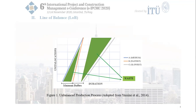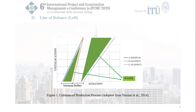Stage buffers between major phases introduce additional safety contingencies for the duration of each activity in a network. The optimum rates for production can be defined by the functions of natural rhythm. RDT in 1988 defined natural rhythm as the optimum rate of production that a crew of optimum size will be able to achieve, and Biotta in 2017 used it as a delivery rate. Any rate of output difference inevitably yields idle time for labor and equipment. In LOB, to shift the start time of an activity, the activity must be assigned a finish-to-start relationship with its preceding and succeeding activities. The slope conditions differ depending on whether the activity is in the first or last unit.